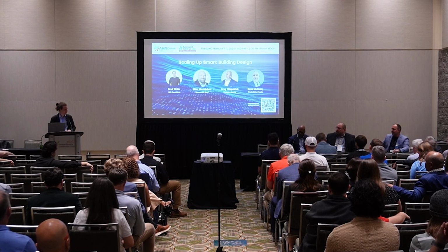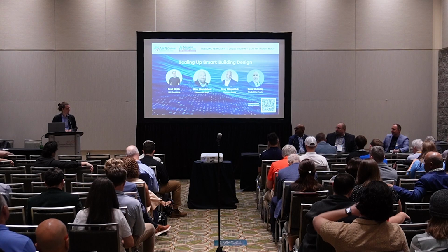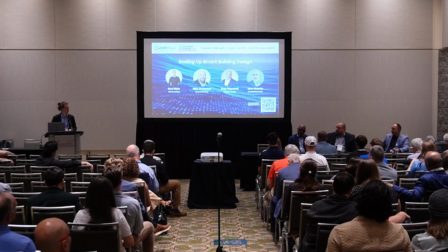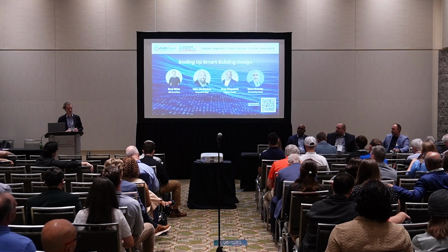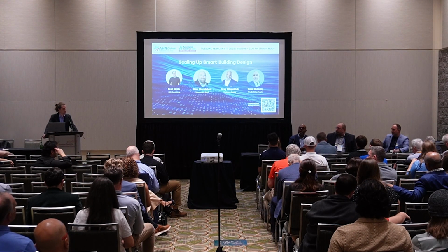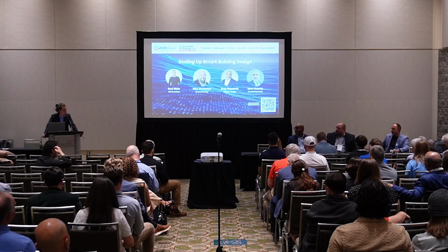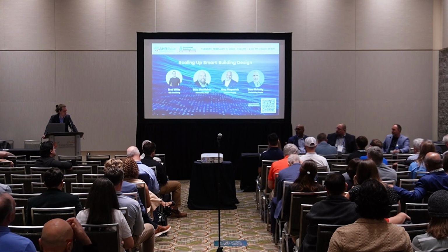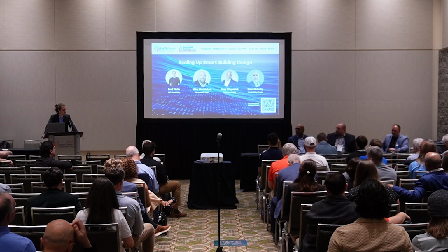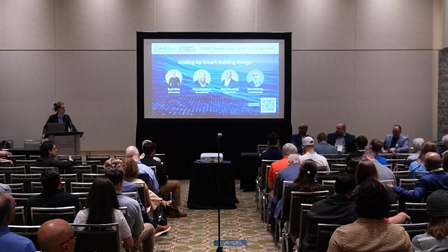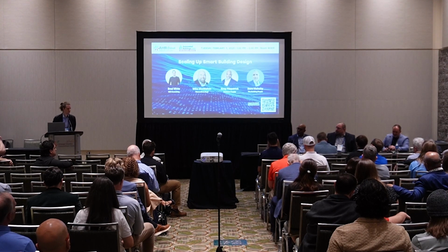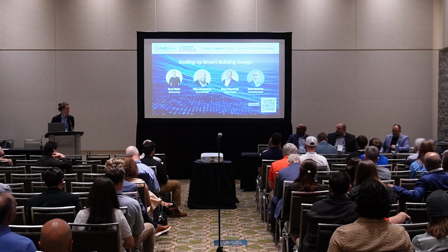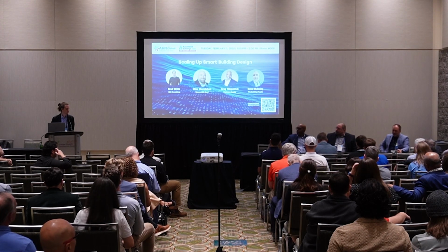Well, I think one of the most important things is to make sure that commissioning is hired directly by the owner, that the owner holds the contract, so that the commissioning agent is working for the owner on his behalf and not adherent to the construction schedule, right? Because I've been in both situations. I ran a small commissioning firm for a while, and I used to have to massage my process based on the job and how it was procured. So if I have a construction management company running the job, then I would make sure that I'm an extension of their team if they don't have anyone on the mechanical side.